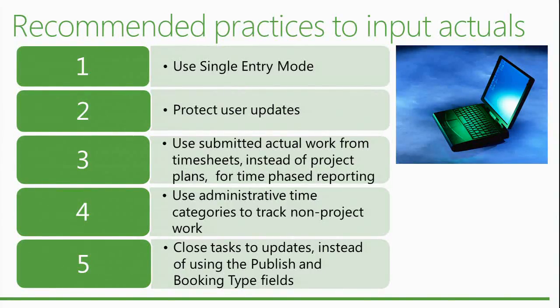Yes? You may get to it. Just a quick question on the administrative time. How much ability do you have to classify those? Can you make them anything you want, and those are all non-project categories? Are they set in stone? No, some of them are default. Some others can be created by you. You can add as many as you want. And you have an additional field called classification that you can use to categorize the admin time further, or what we call admin time, that is non-project time, anything that is not an assignment.